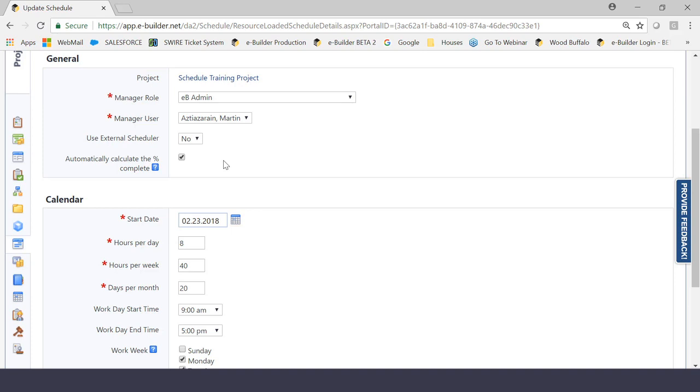So let's hypothetically say a specific activity in the schedule module starts on January 1st and ends on January 10th. If you were on January 5th, the system would assume that you are 50% complete with the task because you are halfway between 1 and 10. Now if you click this, the system will automatically update that percent complete for you. However, in the construction world, I find that most people like to have a little bit more control over that percent complete, specifically when it revolves around invoicing.